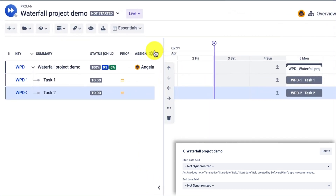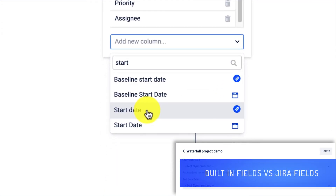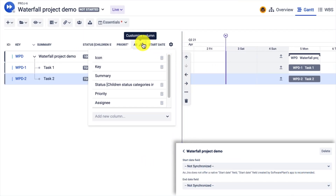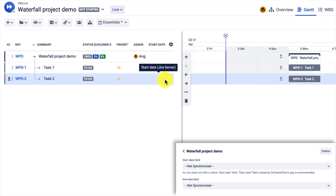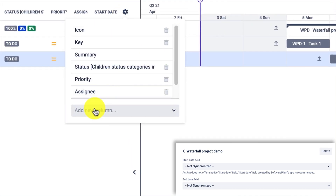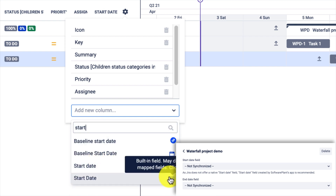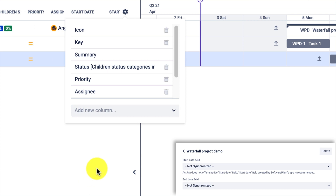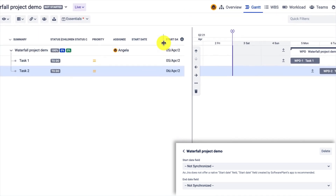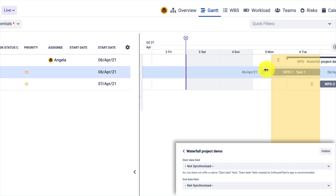Let's adjust this view a little and add the Start Date field. There are two types of fields. The first one I just added is the Jira field, and since the fields are not synchronized, there is no date for that particular field. If I add the same field using the other icon — the building field — this is a Big Picture or Big Gantt field, which displays all the data estimates from the synchronized fields, but also directly the start and end date from the timeline. Whenever I extend the task or drag the left edge, it will be updated.